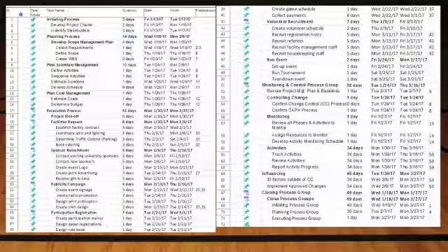For instance, the deliverables in the execution phase are facilities request, sponsor recruitment, publicity campaign, participation registration, volunteer recruitment, and the running of the event. These tasks cannot be accomplished until certain tasks in the planning process are already done. This information can also be used to produce a Gantt chart for further visual aid.